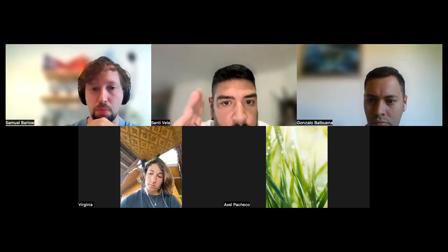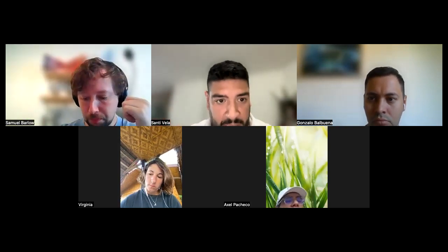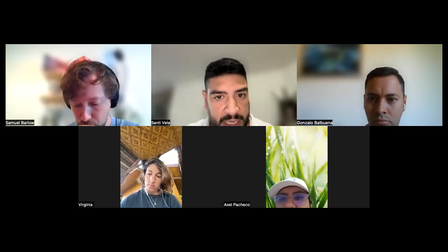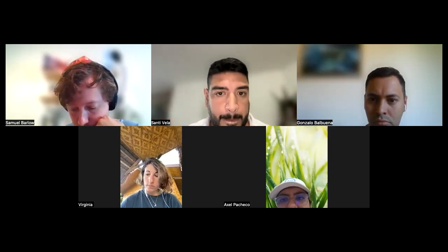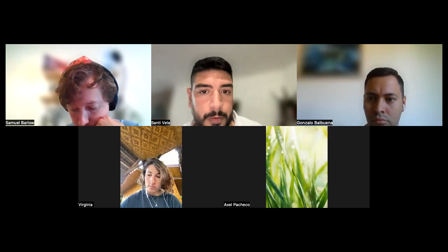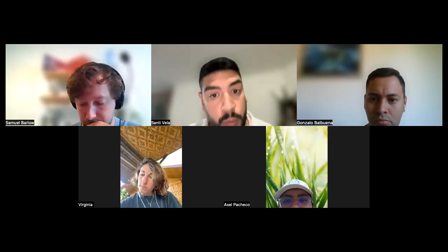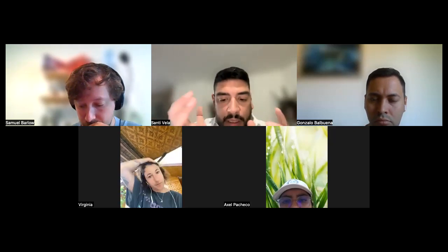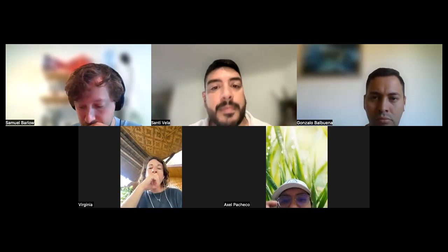So how do we do the WBS? Please remember. First, we break down the project goal in big chunks. And we call those chunks project stages. Stage 1, stage 2, they are huge. And usually, guys, for you to know, projects have 3-4 stages because they're huge. Below each one of the stages, you have something that is called working groups or activity groups, which are activities related, all clustered in one activity group. So you can give that cluster to a team, isn't it?